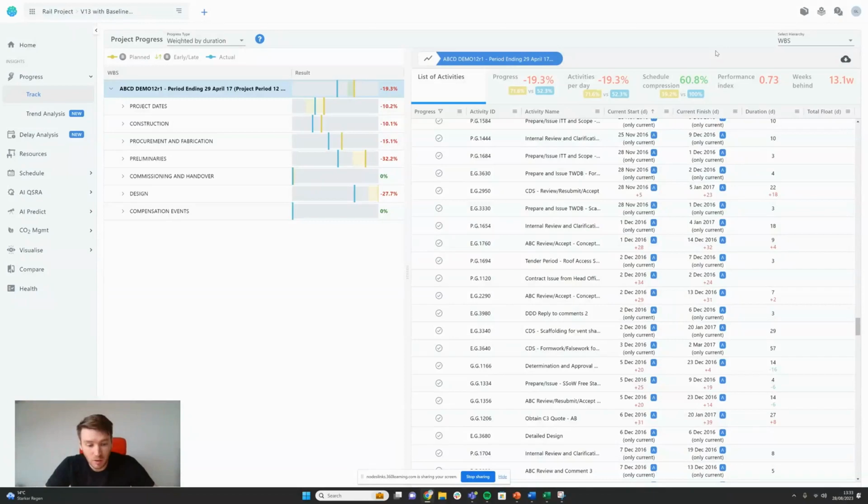They take a week longer and end because of that 2 weeks later. Why should I believe, given that you don't have this much float in your program, that you are going to deliver on time? We need a proactive conversation about how we can either increase your productivity or put buffer into the program so that we're not delayed.